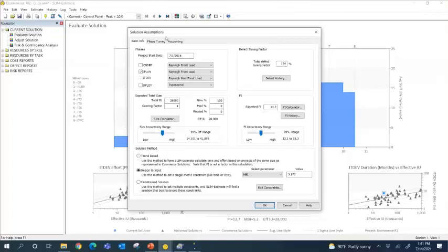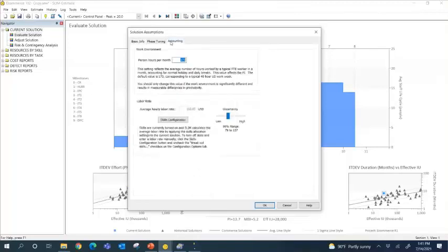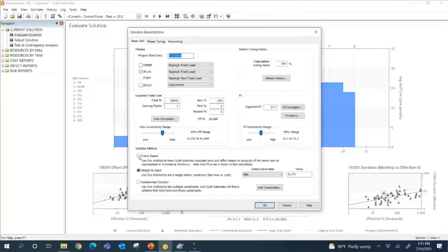There's actually a little bit more information you can put in. We go ahead and enter in a labor rate. Okay, this can populate automatically for you based on your previous work, or you can change it and break this out into level of detail, right? Many levels of detail. And then I'm going to make a decision. Do I want to do the estimate based on the industry data? Do I want to do the estimate based on my own historical data? And do I have a specific parameter that I'm tied to?